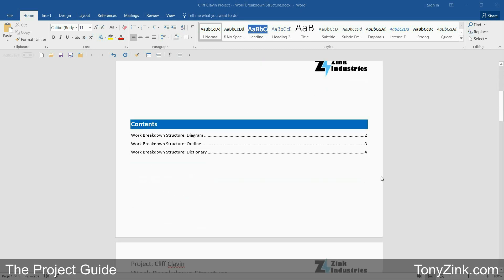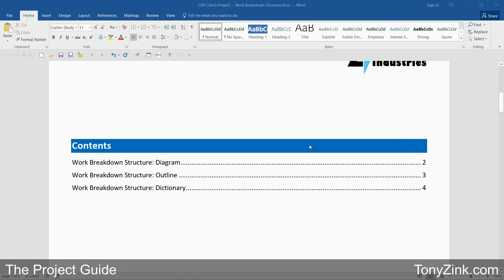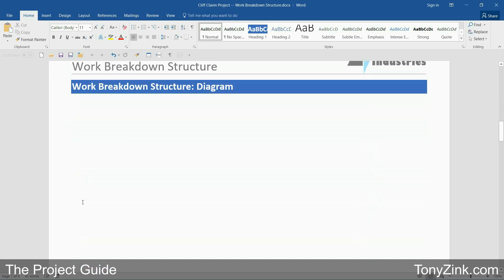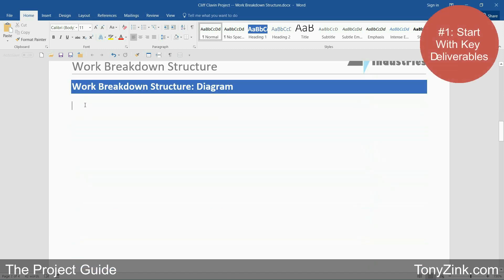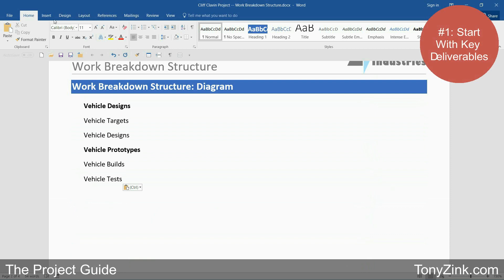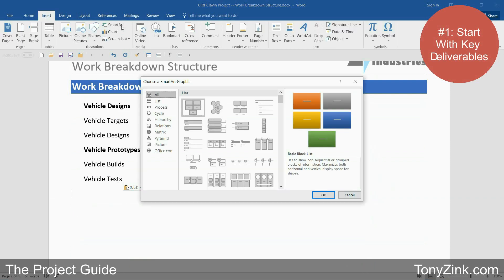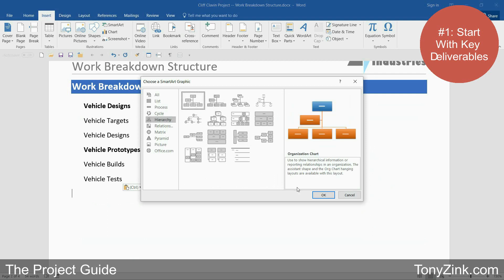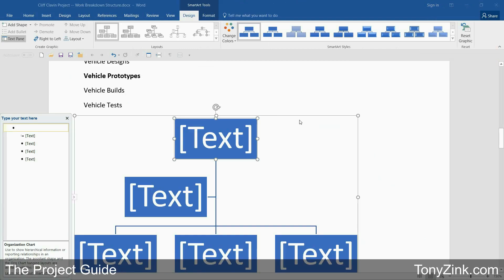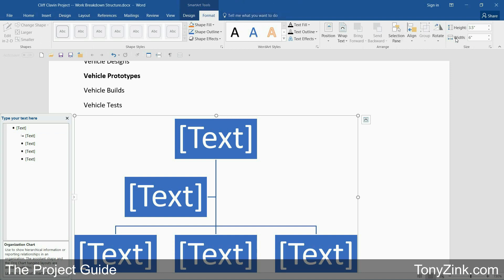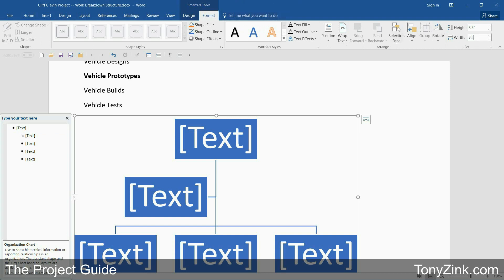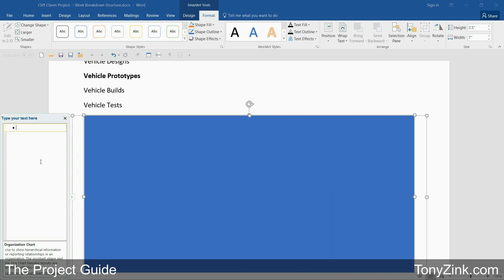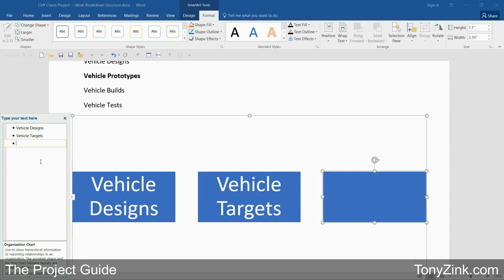Here's a document that I'm using to create a work breakdown structure for my new project. It's organized into three sections: work breakdown structure diagram, outline, and dictionary. I'll start in the WBS diagram section and enter the key deliverables that I've already identified with my customer. This will form the initial structure of our WBS. I'll then insert the organizational chart smart art diagram into the document, update the width to fill the page, clear out all the placeholders, and enter the key deliverables into the text box on the left side of the smart art diagram.